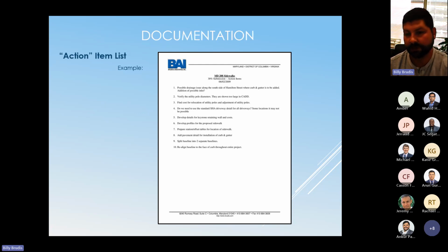More times than not, once you make a submittal, you may not have the project reactivated for 5 months, 6 months, maybe a year. If we develop these action item lists for a project at a submittal, it's kind of a pause button for the project, so that when somebody comes back to it, however long after we make a submittal, it's a refresher to let them know what they didn't do yet, what still needs to be done.